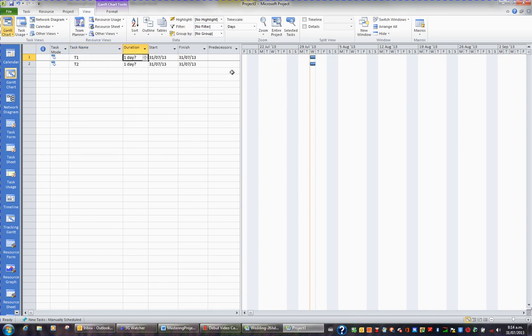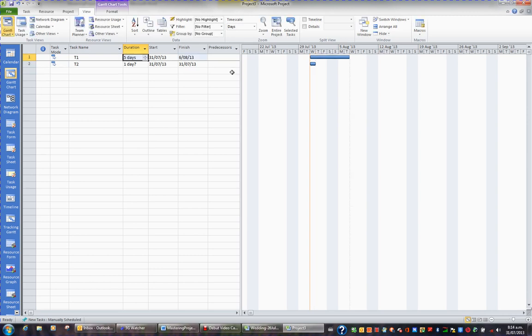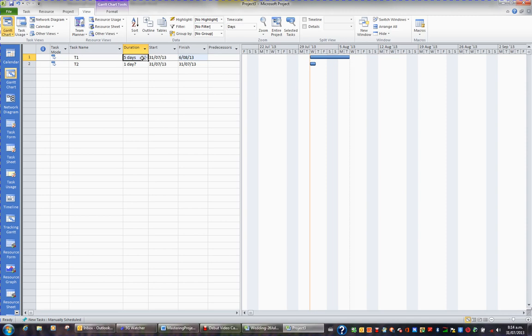Now let's change the duration from task 1 to 5 days. 5 days means that I'm working Wednesday, Thursday, Friday. I'm not working Saturday and Sunday, so I'm then on working Monday and Tuesday. So this particular duration, because it's a day, is adhering to the project calendar, and it makes the bar seven days long because we don't work Saturdays and Sundays. So it binds by the project calendar.